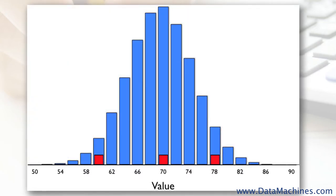Once you see the distribution, based on the uncertainties, you would see that there is only a 5% chance that this portfolio will achieve this value, and a 95% chance that it won't. So this portfolio is highly overvalued. Now, if we go to the low one, we can see that there is a 95% chance that the actual value of this portfolio is higher than what has been estimated here. So this portfolio would be largely undervalued.